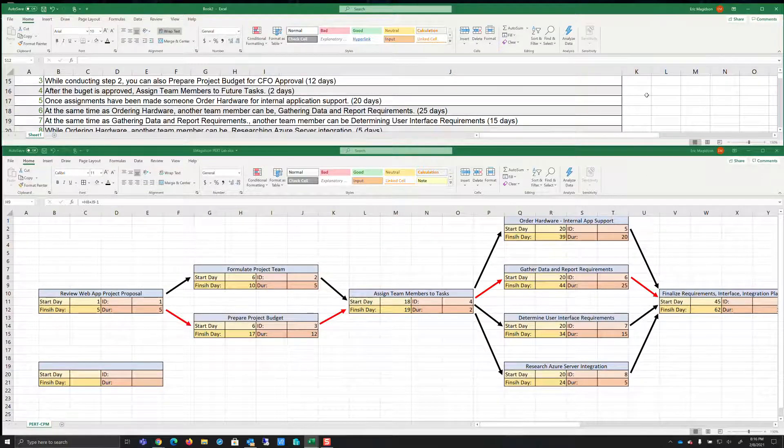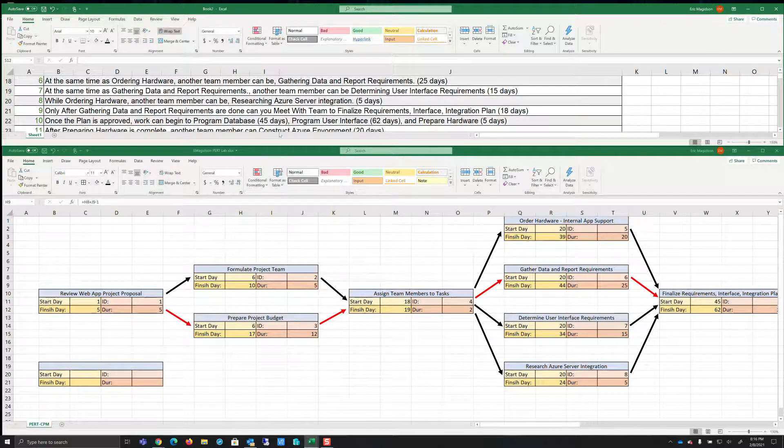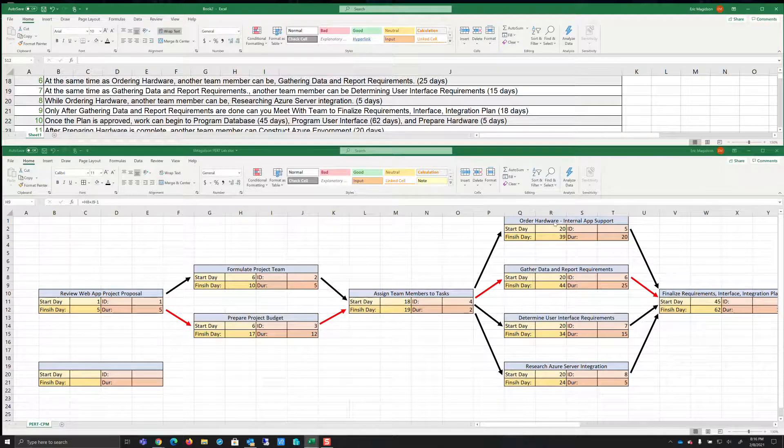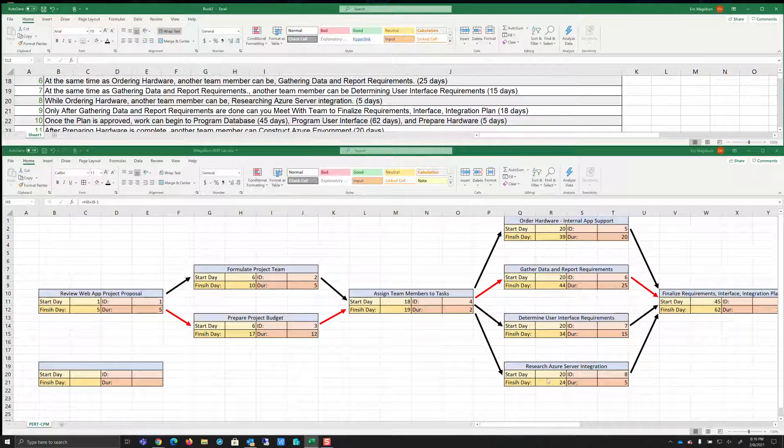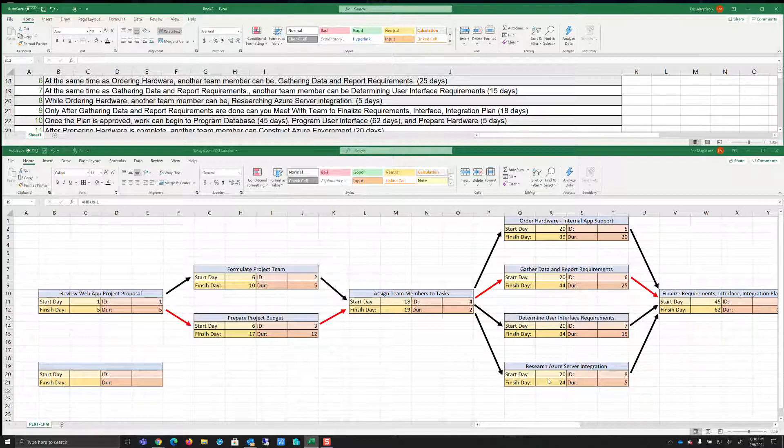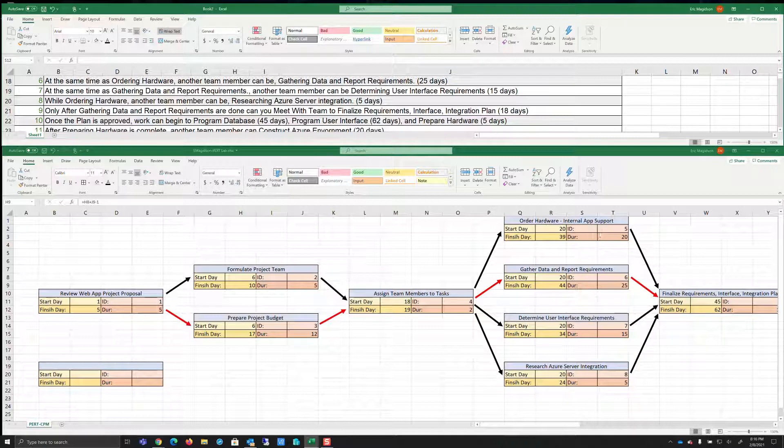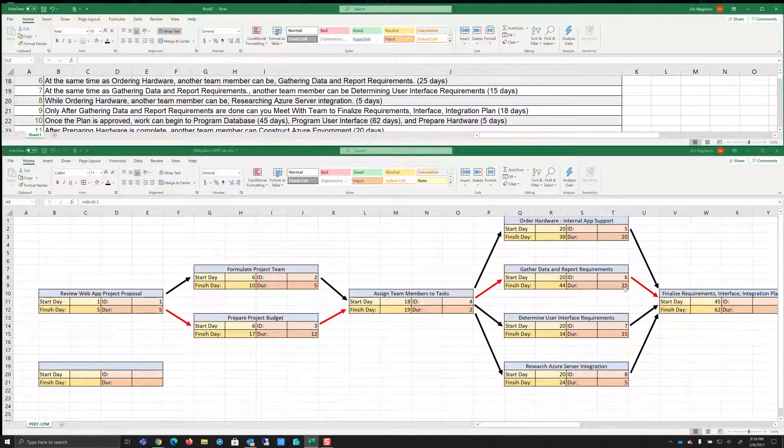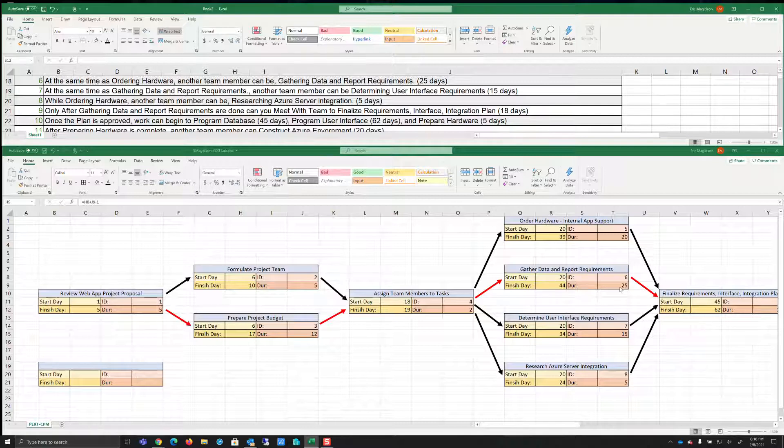It says at the same time as gathering data, which is also at the same time as ordering, we can go ahead and determine user interface requirements. That's 15 days. And it says while ordering hardware, which since these are all being done together, another team member can research Azure server integration, five days. So as we look at all of this, we know that our longest day is 25 days. Our longest task is 25 days. And thus we take 20 plus 25, which is 45 minus one, and we get 44.